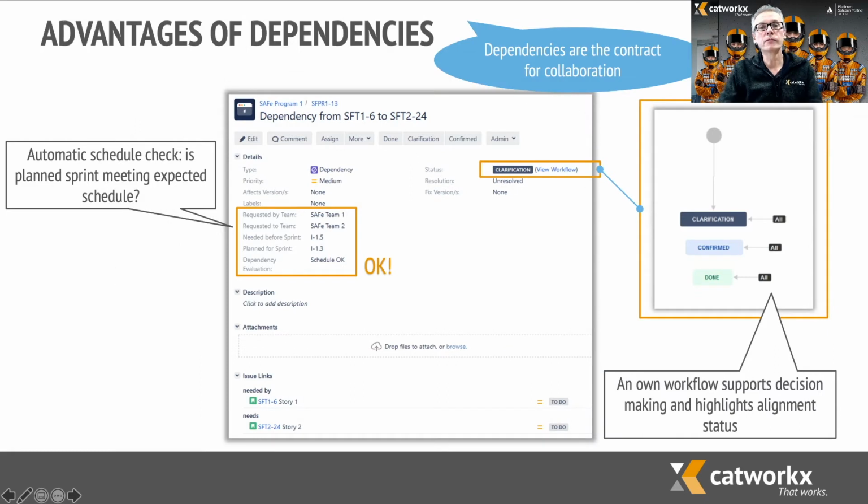An important feature of the blueprint is the modeling of dependencies. You can define dependencies as a contract for the collaboration between teams. The administration of dependencies after PI planning is very complex and may be expensive, in the case of blocking the results from one team because of the missing delivery of another team. The blueprint will automatically check the dependency regarding the timeline or the needed results and gives you an overview of the status to elaborate missing commitments in advance of an escalation.